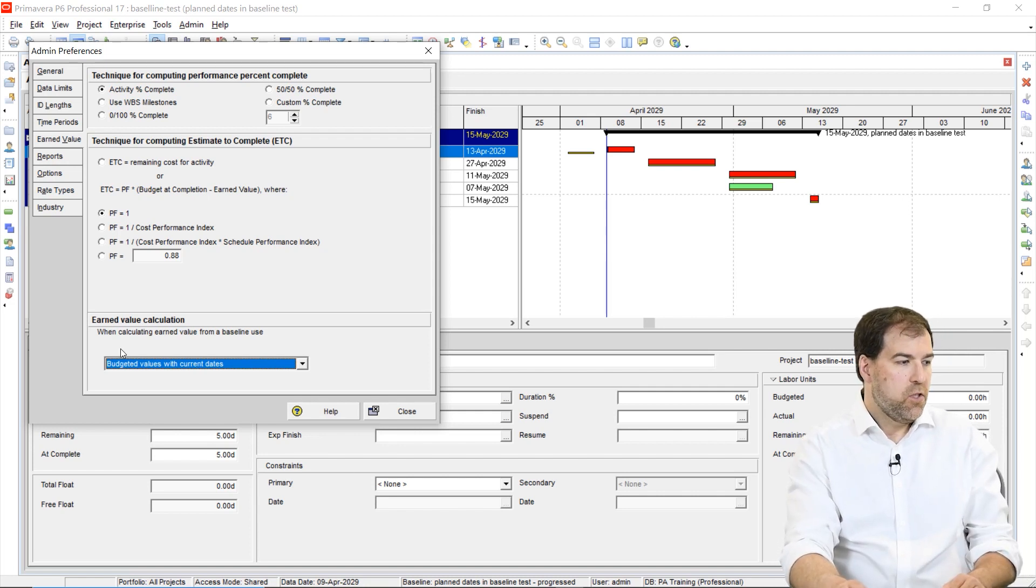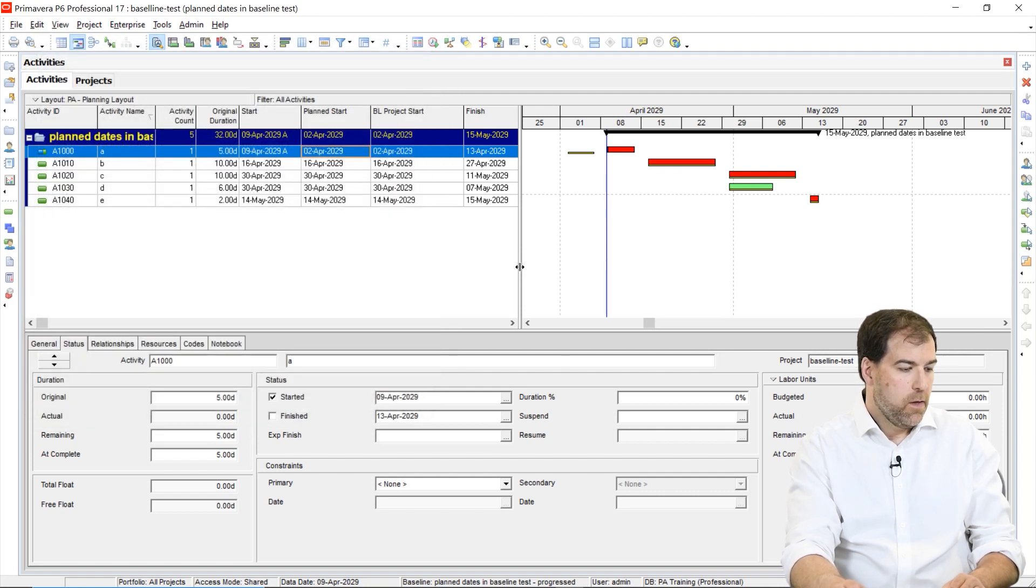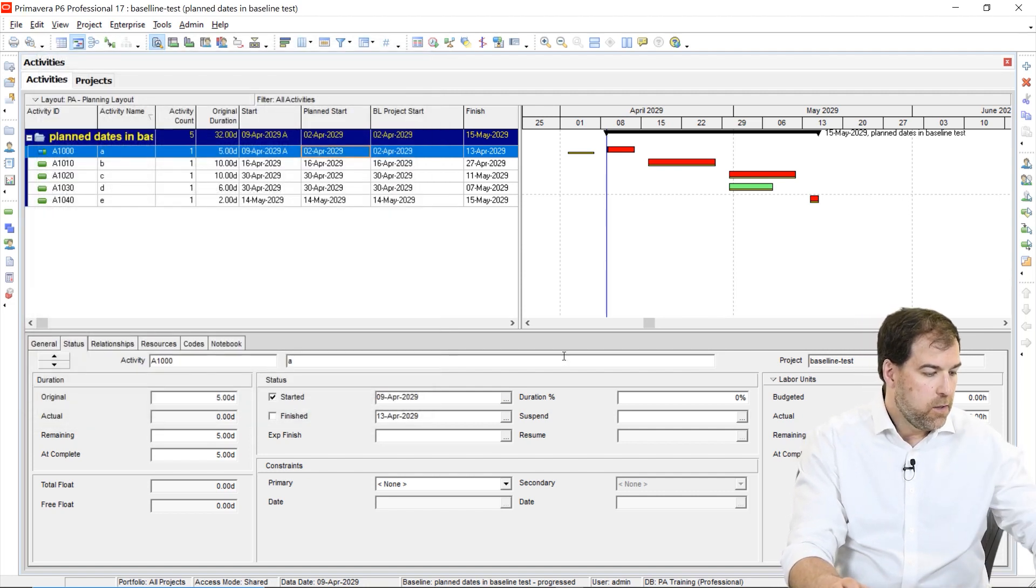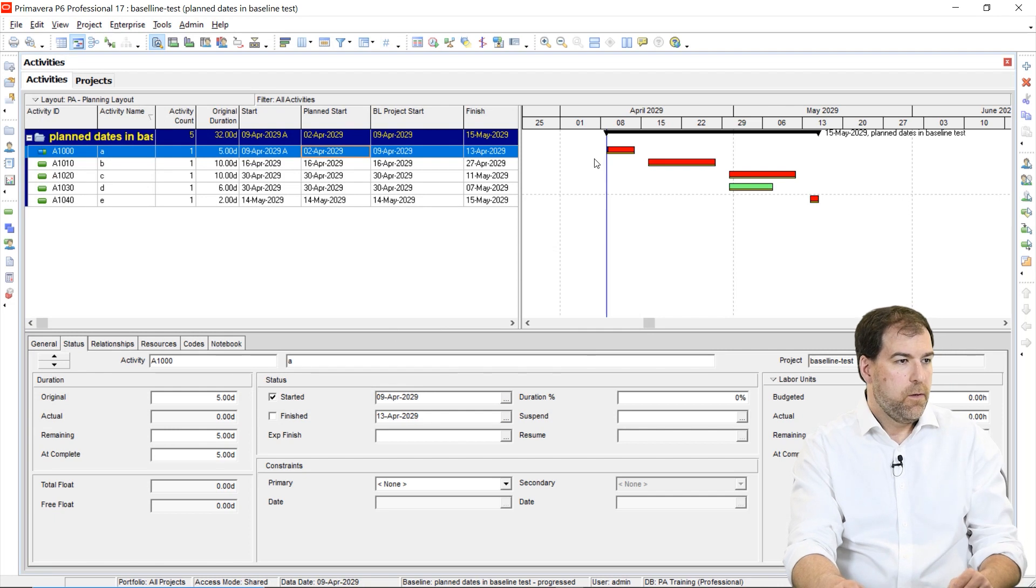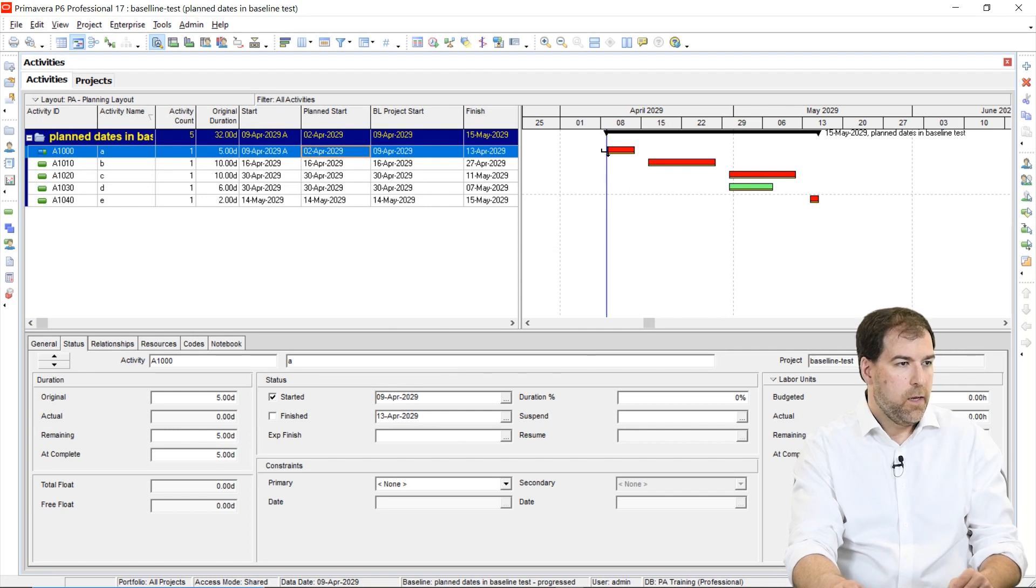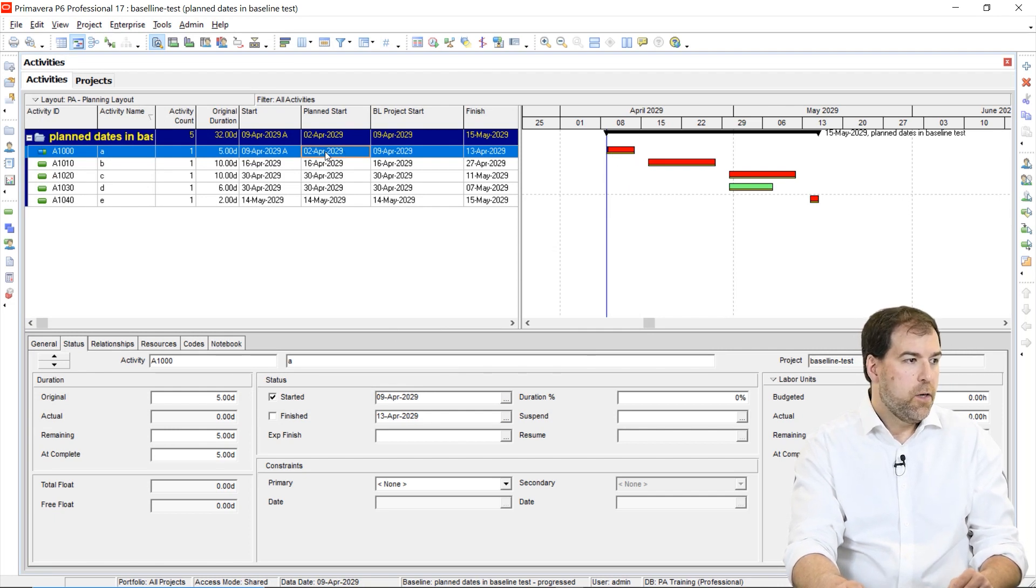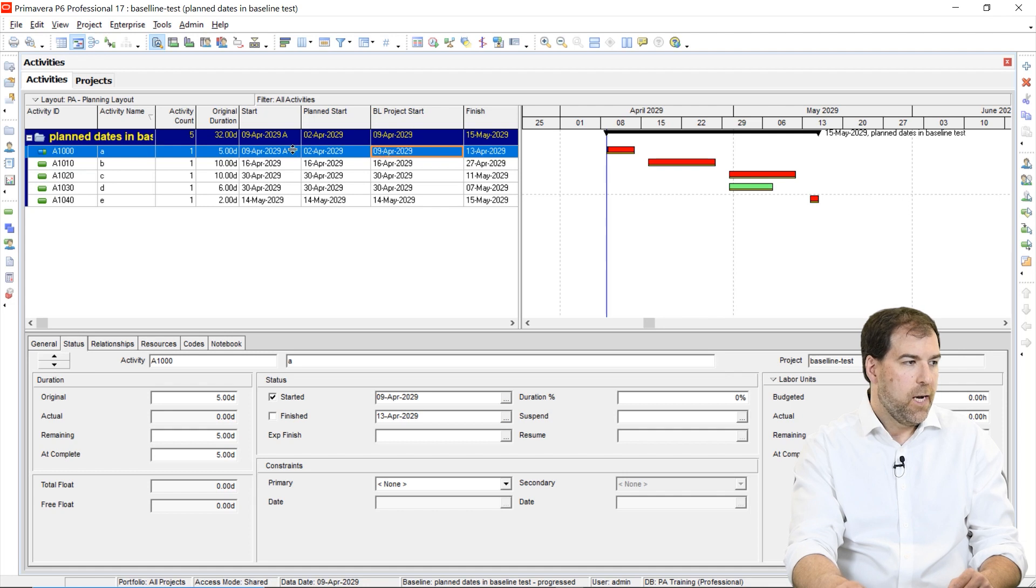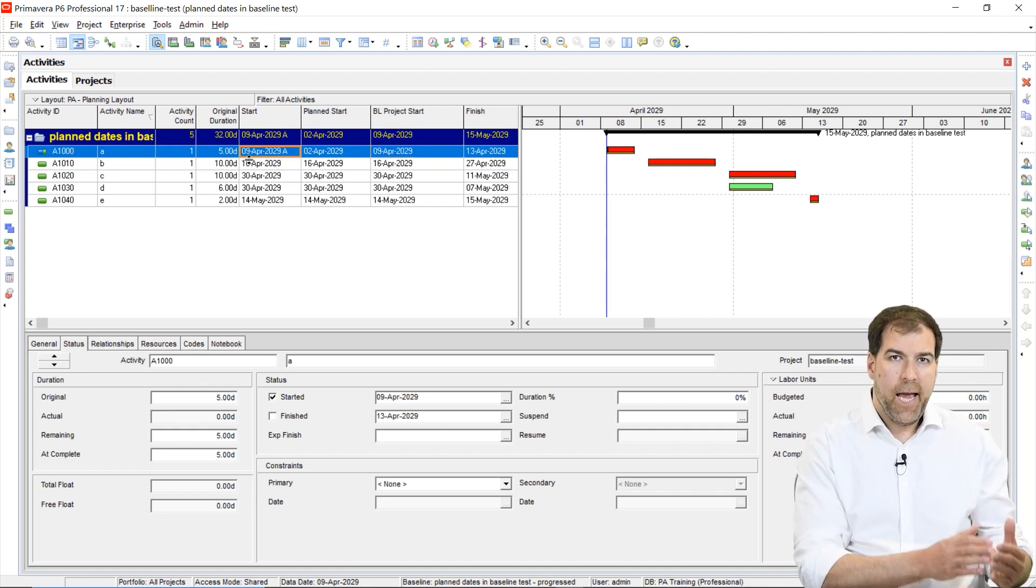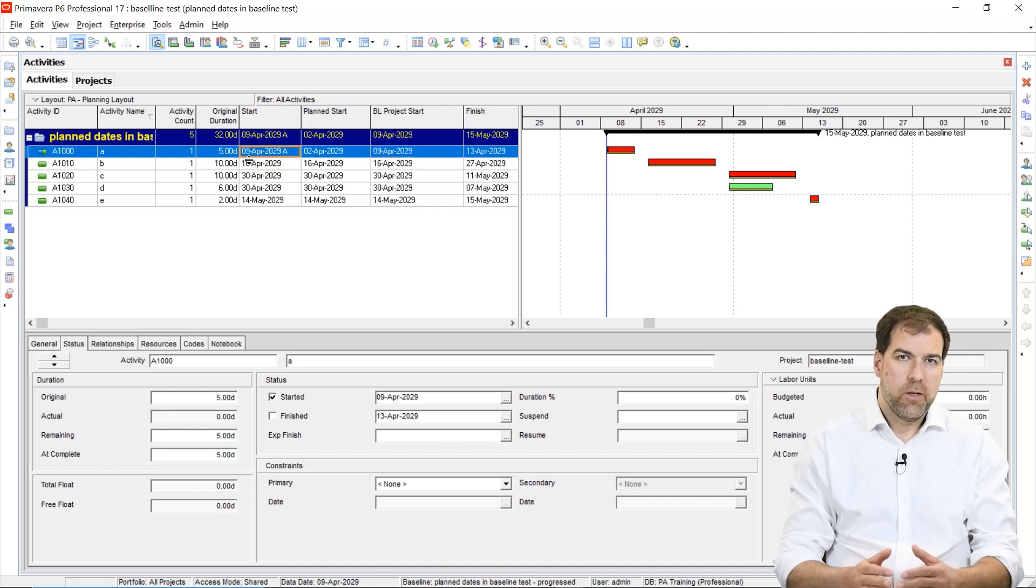So when I change this value, this setting, watch what happens. And I just need to do an F5 to refresh the screen. And there you go. Now you can see that I'm no longer displaying a baseline start date of April 2nd. I'm now displaying the baseline start date of April 9th, which is the actual start.